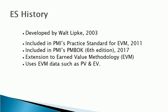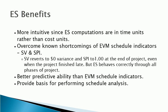Earned Schedule is an extension to Earned Value methodology. It uses EVM data such as Planned Value and Earned Value. There are several benefits of using Earned Schedule. It is more intuitive because ES computations are in time units rather than cost units. It overcomes known shortcomings of cost-based schedule indicators.